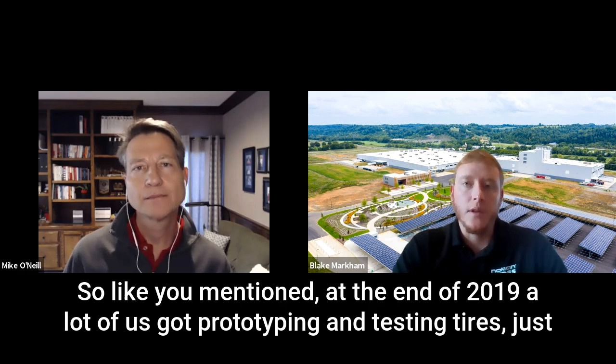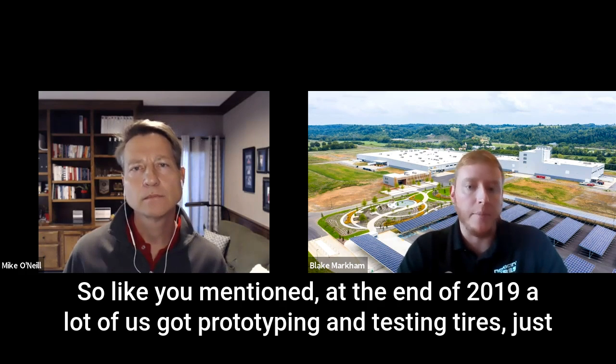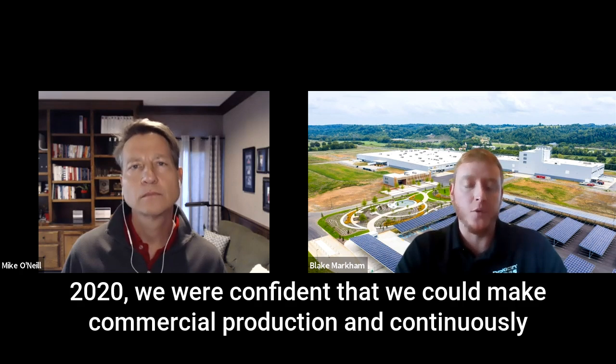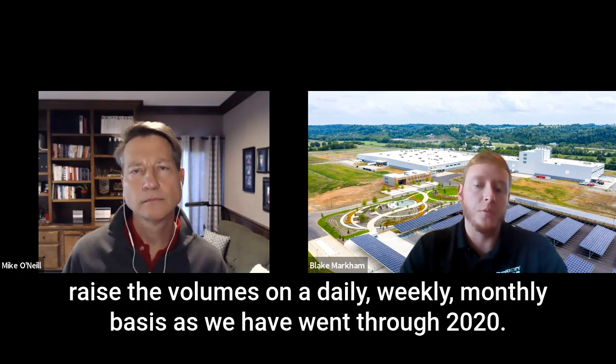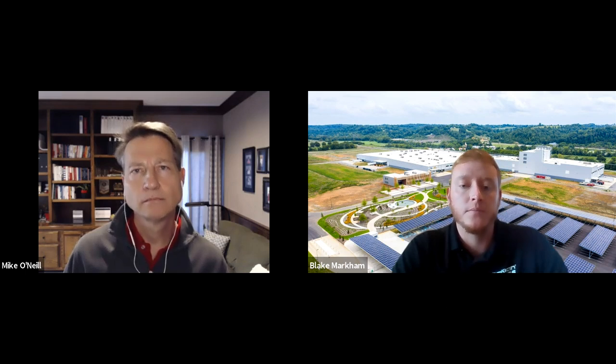Yes. So like you mentioned, at the end of 2019, a lot of us were prototyping and making test tires, just making sure we're stressing our systems so that when we turned everything on in January of 2020, we were confident that we could make commercial production and continuously raise the volumes on a daily, weekly, monthly basis as we went through 2020.